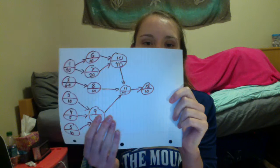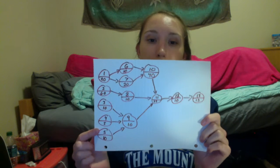Activity 12 requires Activity 11 to be completed, so an arrow will go from Node 11 to 12. Activity 13 requires Activity 12 to be completed, so Node 12 will have an arrow going to Node 13. And it should look like this — this is your finished AON network.